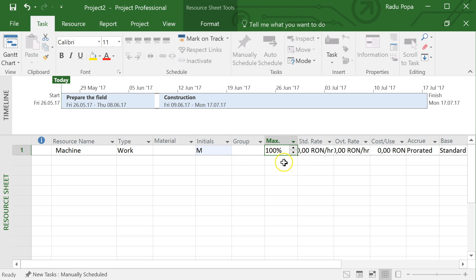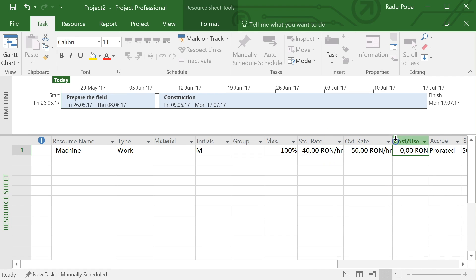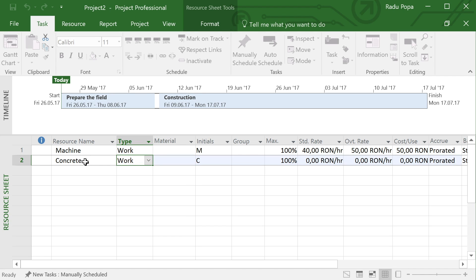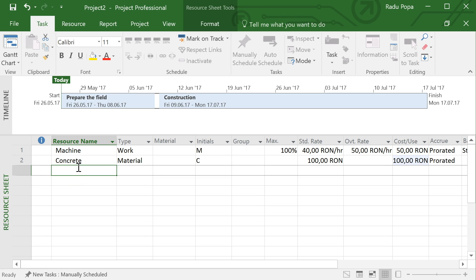Let me define some resources. The first is a machine — at 100% availability, meaning eight hours a day. The standard rate is 40 lei per hour, overtime is 50 lei, and cost per use (like a travel/delivery fee) is 50 lei. Next I'll define concrete as a material resource, with a standard rate of 100 lei per unit and a cost per use of 100 lei for the delivery.